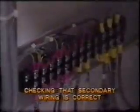Briefly, protection personnel activities should include the following: review of primary block diagrams, visual inspection of the primary equipment installation, review of protective scheme schematics, AC and DC, checking that the secondary wiring is correct, review of the results of circuit breaker tests, testing of CTs and VTs, secondary injection tests, primary injection tests, functional testing of tripping circuits,